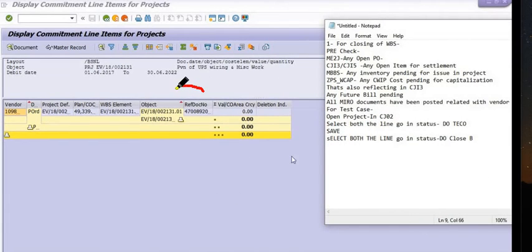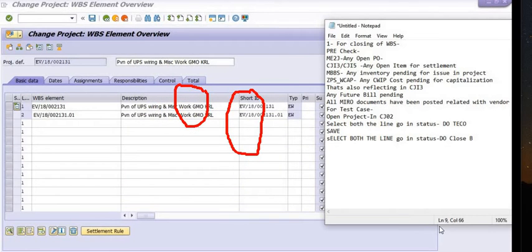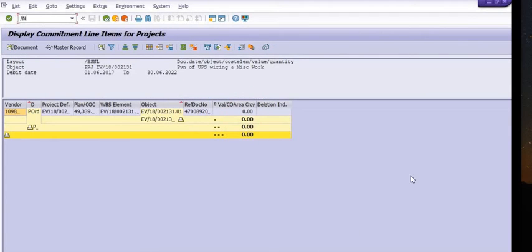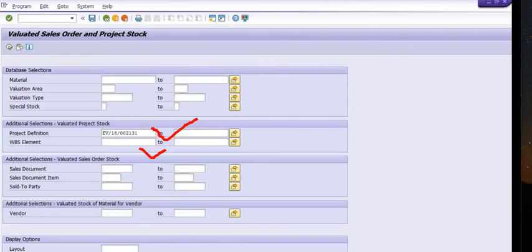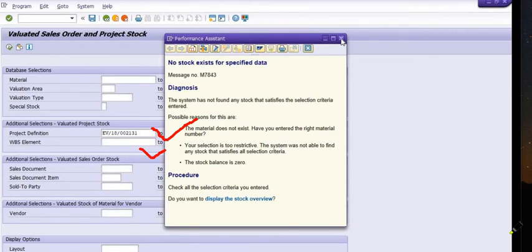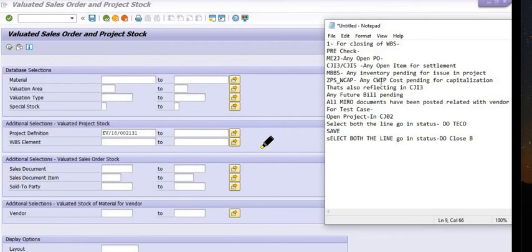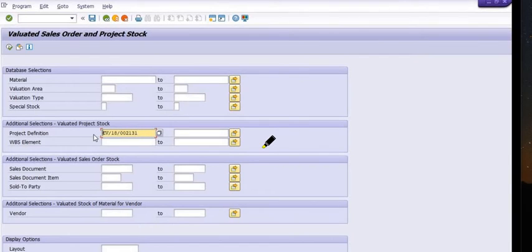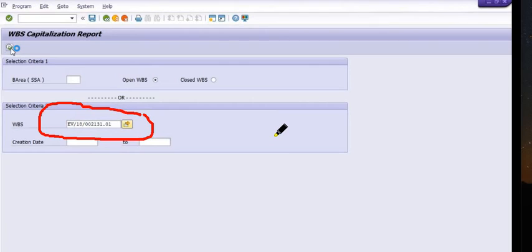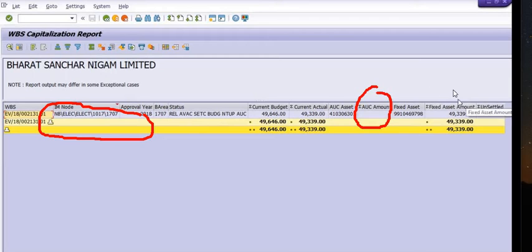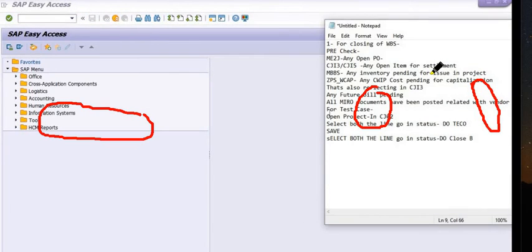Only one purchase order is there and its value is zero, meaning it is completed. The next check is sales order and project stock in MBBS. Use transaction code MBBS, fill in the project definition or WBS element, and confirm no stock exists for that data. Then execute ZPS_WCAP — this is a customized transaction code for CWIP and unsettled cost. Fill in the WBS and execute. No AUC amount and no unsettled cost are pending, and all values have been capitalized.